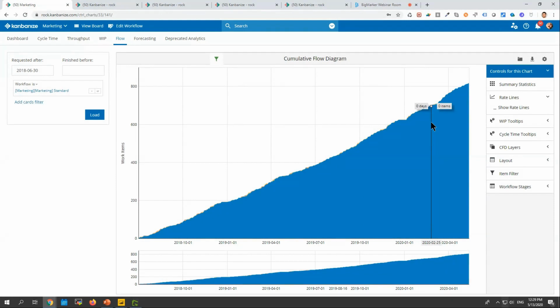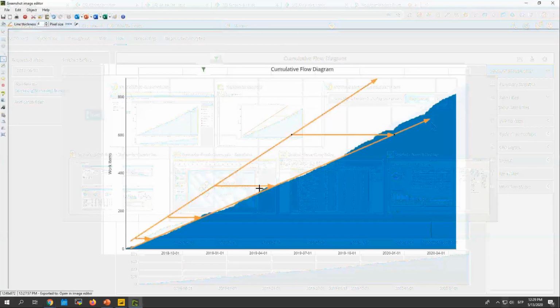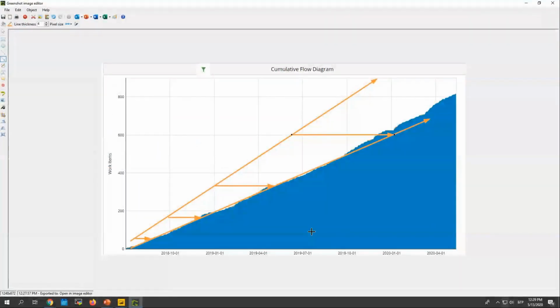If you don't apply any WIP limits, and if there's a push behavior, which means that we enter new work into the system without necessarily having something out of the system, it might happen to be like this. And then cycle time just goes out of control.